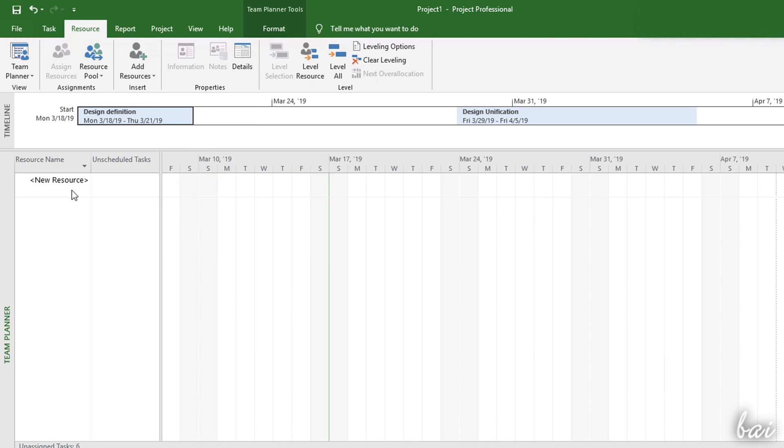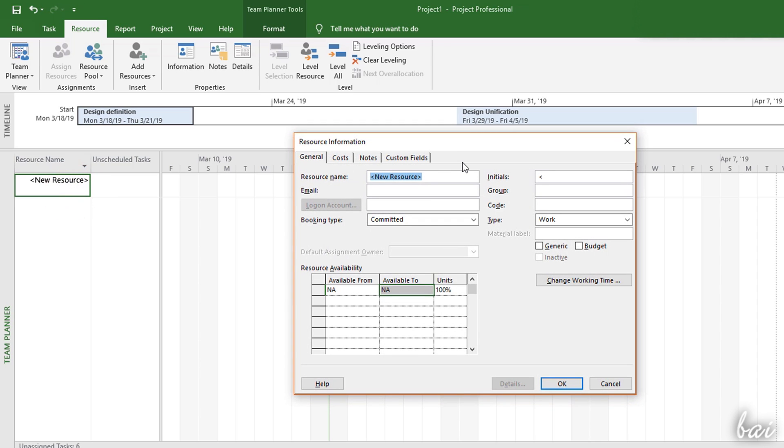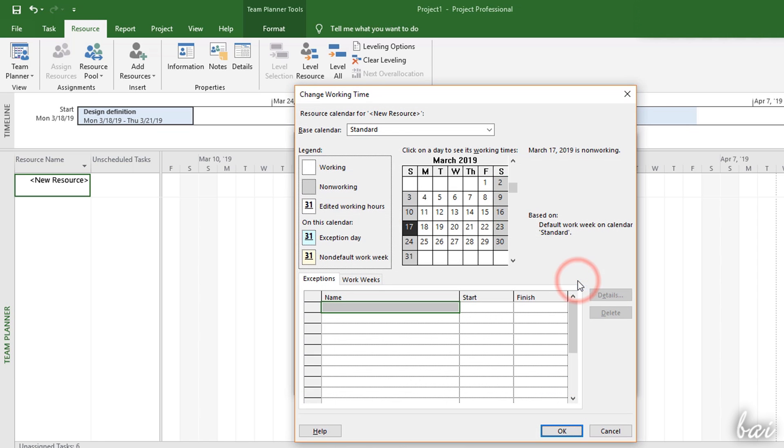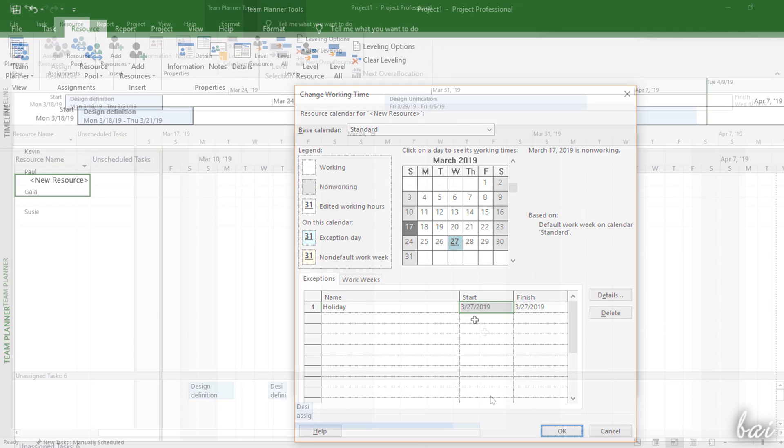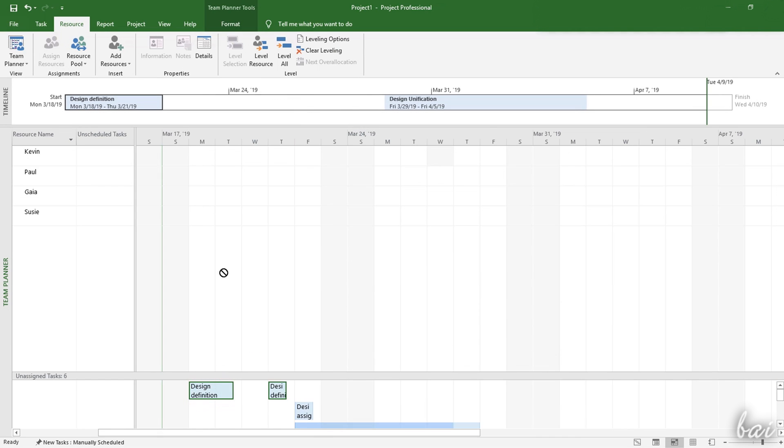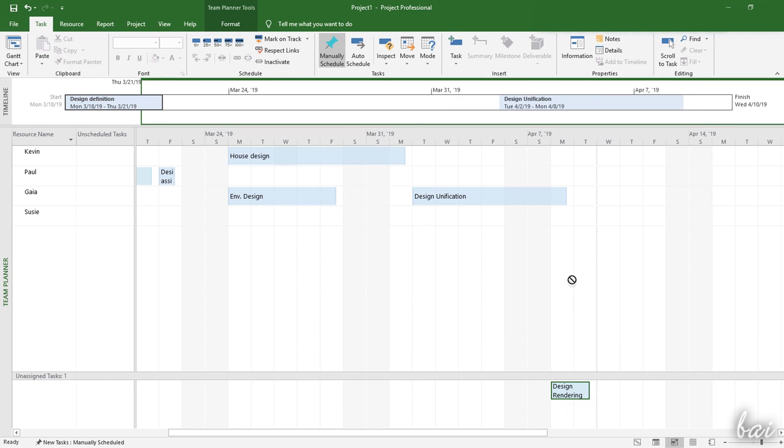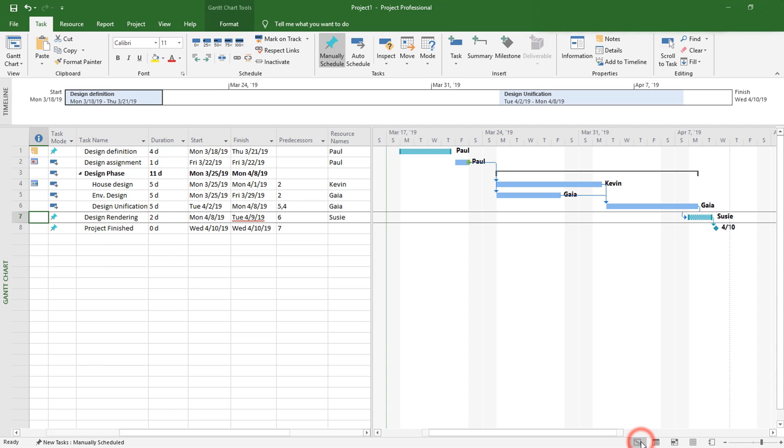Then double-click on the new row to define name, email, group, availability, specific working days, holidays and the resource cost. Then you can assign any tasks by dragging and dropping these on the right resource row, respecting the timeline placement. Once assigned, these tasks show the dedicated resource names on the Gantt chart.